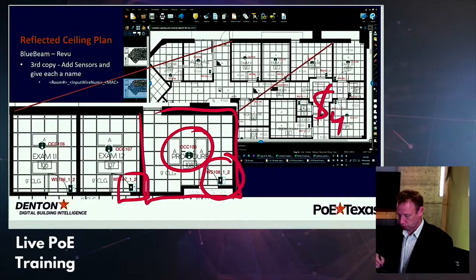One of the things I'll reiterate again, I really like the fact that you do an Excel spreadsheet of the fixtures, because Excel spreadsheets nowadays import so well into CAD drawings. The goal is that you're not recreating. If you manually create the table on the drawing, any changes, you have to go back and update it. Very often now, a good CAD system will just link to a spreadsheet, and you track your items on that spreadsheet, so as you're making as-builts, as you're correcting problems that come up through RFIs or change orders, you're not having to manually update.